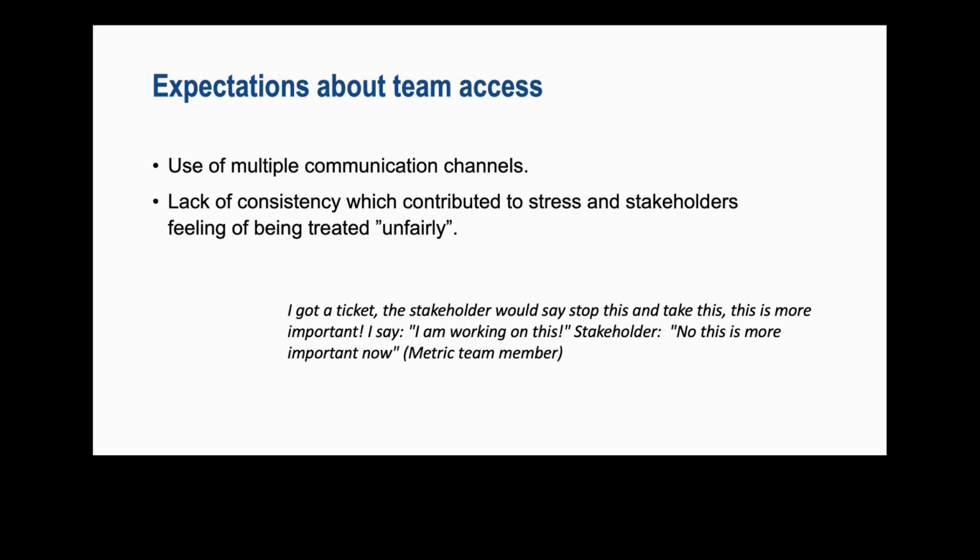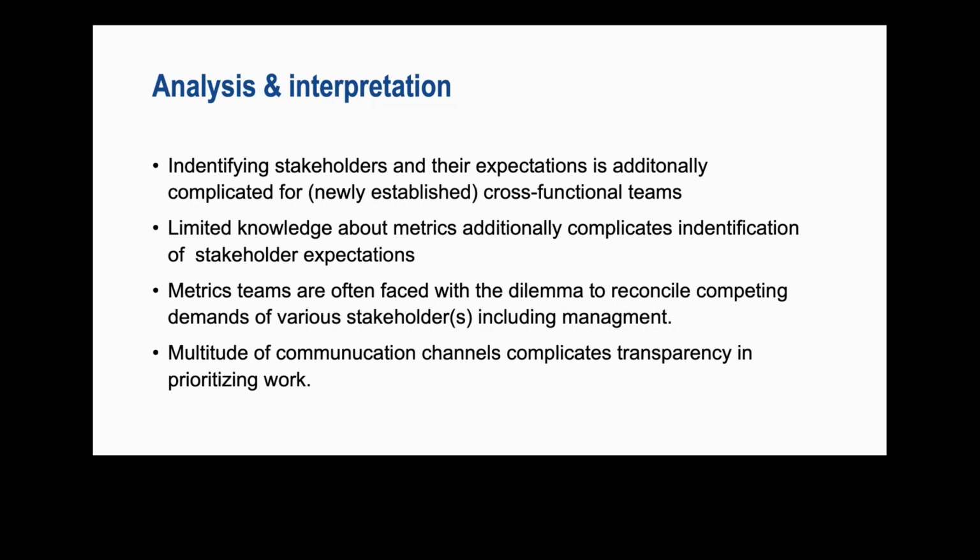And it also created stress for the team because they had to switch from one task to another. And it also resulted that some stakeholders felt that they were treated unfairly. And this fairness aspect, if you look at stakeholder literature, it's very important that stakeholders feel that they're treated fairly in relation to prioritization. So this is something that can really damage team stakeholder relationship, which is worth looking at. So all from me, Dina.